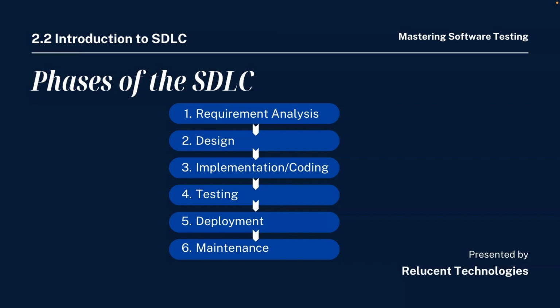So they're checking whether the software is built for the business needs. Okay, and they do different types of testing. We just talked about different types of testing, and we're going to talk more on that. But the tester performs various types of testing to identify the defects. Okay, that's the main job of a tester. And key documents of this phase are test plans, test cases, defect reports, and test execution reports.